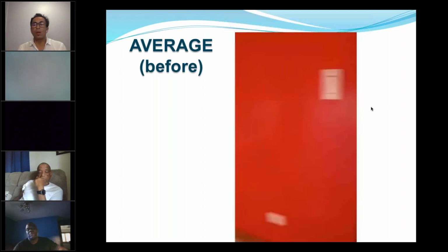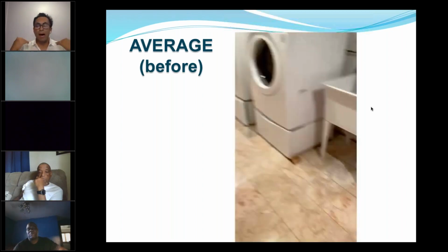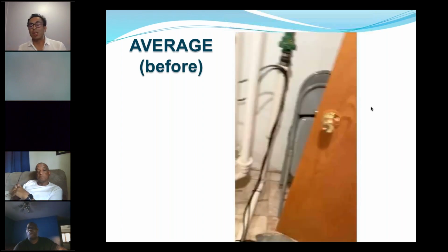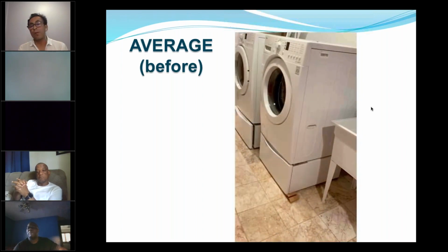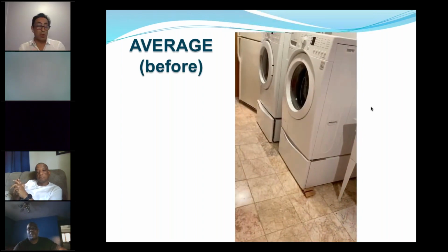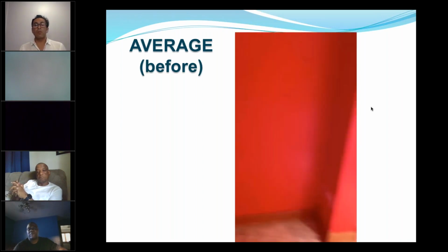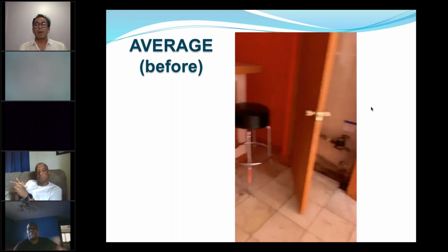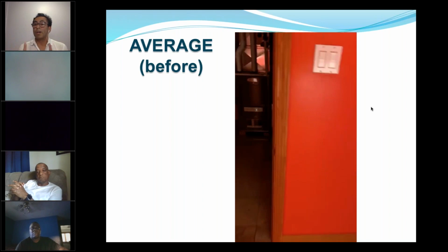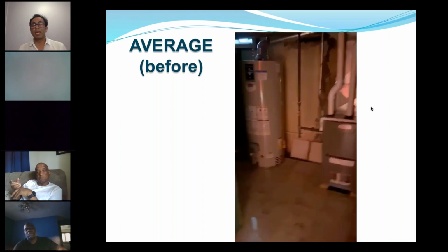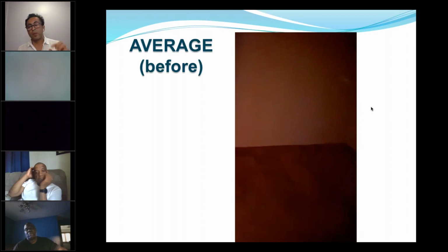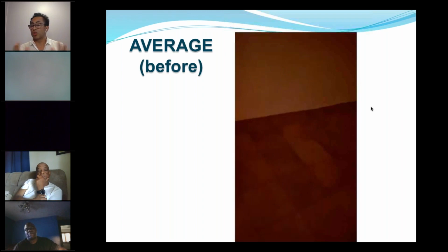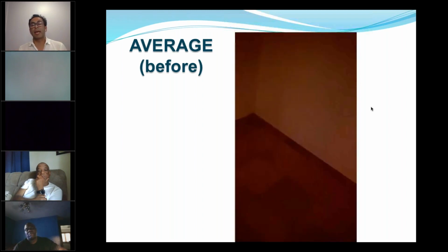Since it's less than 2,500 square feet, my estimation was about 30,000. But when we did the bathrooms and kitchens, it came out to be $34,000, the rehab on this property. And as you can see, look at the basement. It's already finished. The flooring, the paint. To many investors, this may look like a light rehab, but it's not, because we need to touch bathrooms and kitchens. Look at the mechanicals. The furnace and the water heater are in very good condition, okay? But it doesn't matter. We are touching bathrooms and kitchens.